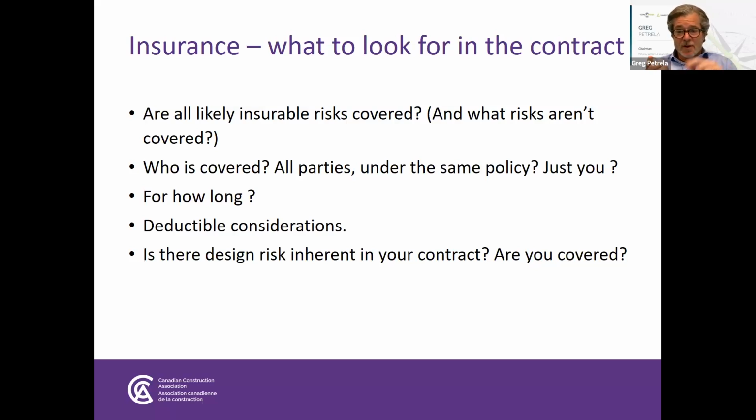So we need to look at the prime contract, the subcontract agreements, the CCDC 41, unless you know it off by heart like we do, and the supplemental conditions, because in those documents you have your answer as to how long the coverages last, because some policies are designed to last longer than others.